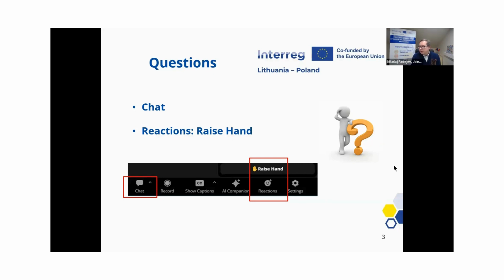And the next question is about the work plan. And this part is not clear. Shall we have a task by task approach or a timeline based sequence of tasks? So it's more like a task by task approach. You describe all your activities and specify during which periods they will be implemented. And then in the time plan, you will see this structure of your work plan by periods.